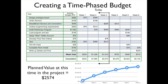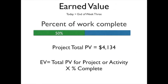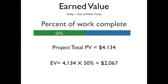We're going to collect the three basic inputs of planned value. We'll run through this example we used previously for cost variance. We see the planned value at this time of the project is $2,574. Our actual costs are $3,000, and our earned value at this point is $2,067.